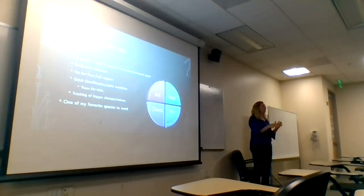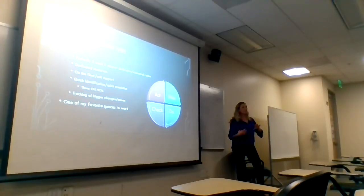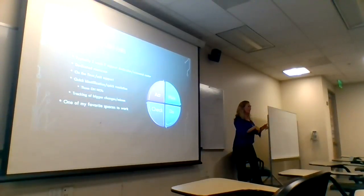A lot of times go lives for us, we usually have like a 2-week dedicated go live support model, meaning IT has a command center, there's a phone number you can call with something that doesn't work, and they're tracking all of those. But a lot of times you have people out on the units providing that support, tracking those issues, doing some basic troubleshooting to figure that out. And I'll tell you, one of my favorite spaces to work is in a command center during the go live. I swear we get more work done because everybody's in the room and it's like, oh, let's fix this and let's do that.